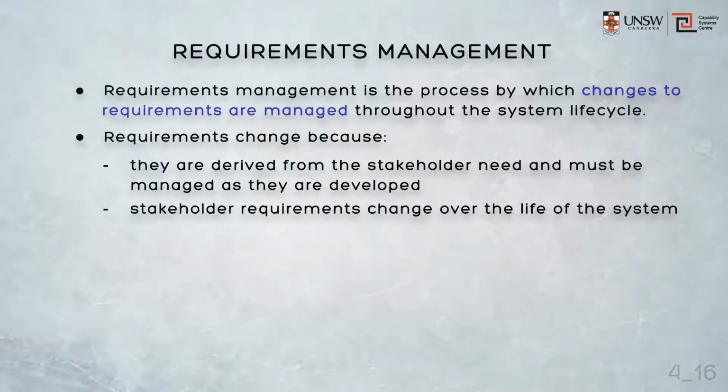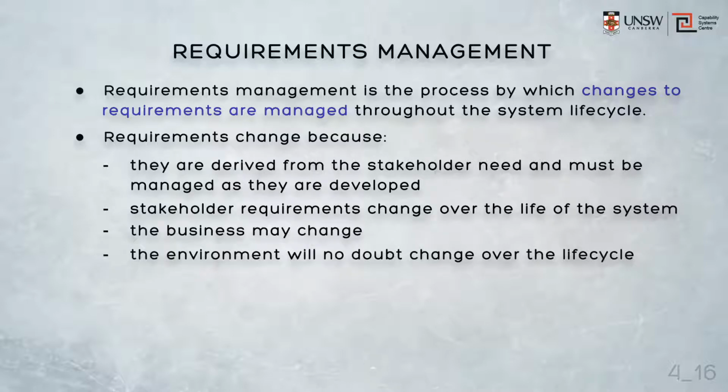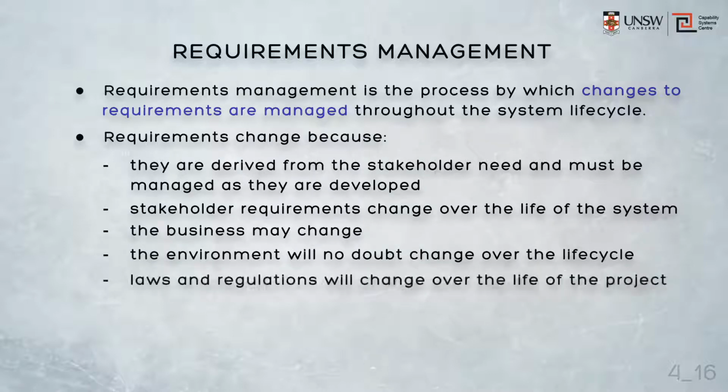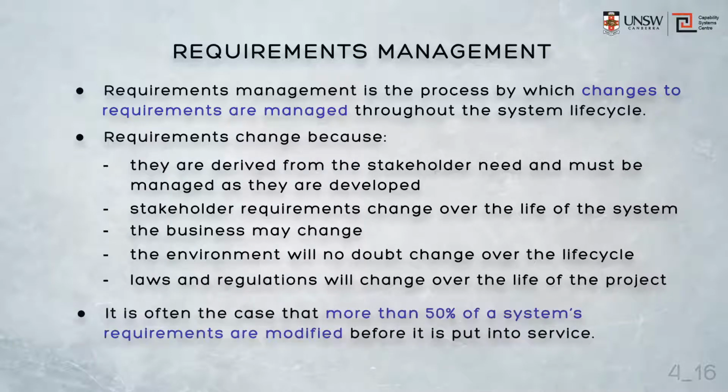That may happen throughout the life of the system because the business may change, the environment will no doubt change over the life cycle of a system, and things like laws and regulations will change, but also there'll be technology changes. It's often the case that more than 50% of a system's requirements are modified before it's put into service. We therefore need to manage the requirements as we develop them.